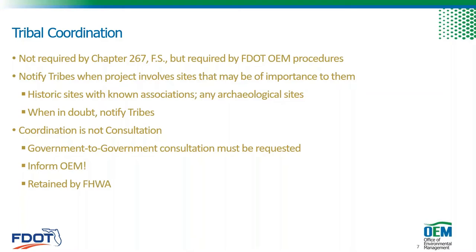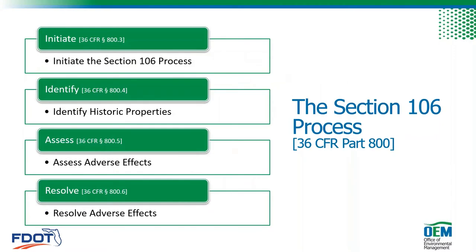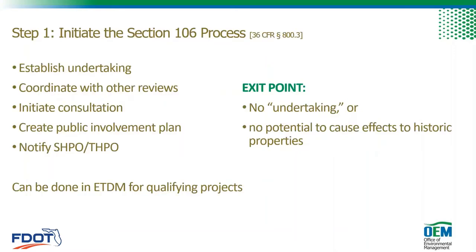I'm going to breeze through the four-step process because the CRM professionals you hire should have a solid handle on it, but I will stop and highlight a few key actions that, when done properly, can save you a lot of time and effort. The four steps of the Section 106 process are: Initiate, Identify, Assess, and Resolve. Two key points to remember: first, consultation with SHIPO — if it's a federal project — or DHR — if it's state-funded only — and public involvement are both required at every step. Second, the process can be concluded at any step depending on the specifics of the undertaking.